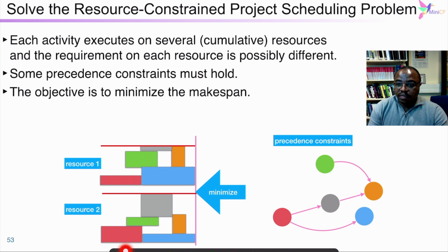The second step of our project is the application of our cumulative constraint on the resource-constrained project scheduling problem. In this problem, a finite set of activities have to be executed on several resources of discrete capacity. Activities can be executed in parallel. They are linked by precedence relations.